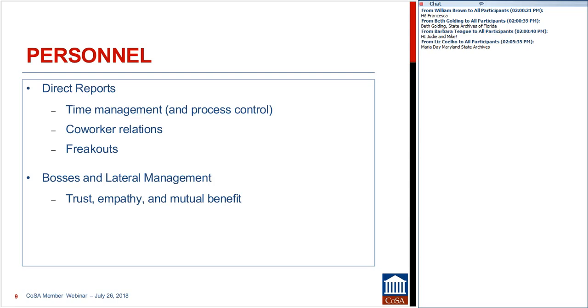I like to ask how things are going, what you would like to do differently, and whether or not there's anything I need to know. And those 3 questions really do help open up communication about how things are happening on the project that might not be clear in larger meetings.